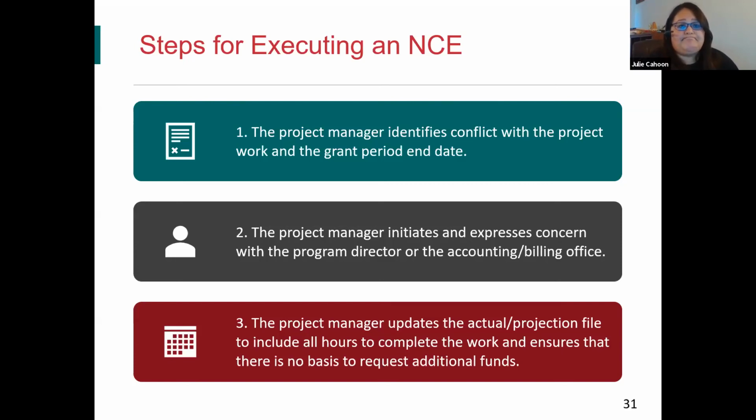So after that internal discussion that you have, you'll need to address your budget. If you need to spend more time with staff conducting the outreach, or you need to add a different software system to gather data online or electronically to get those response rates that you need, how will this impact your budget? Can your budget handle the staff or the software that you need to extend beyond the project end date, but still keep within your budget? So the next step is then, as a project manager, look at your budget. How have things been progressing so far? Is there space to extend without adding additional budgets, and asking your project officer for that monetary support?